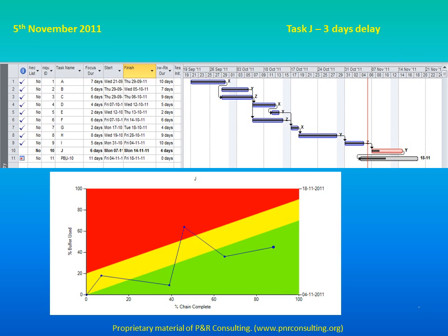Although there had been delays during execution, the project buffer and the reporting mechanism proved useful in monitoring and controlling the project. It is recommended that the project status be updated on a daily basis and the project be monitored with a fever chart. The CCPM add-on has necessary features to provide the fever chart as the output. This fever chart is sufficient to understand the status of the project, thus eliminating time-consuming report preparation activities.